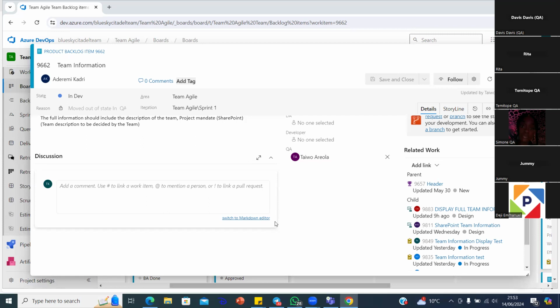And if it's a high priority issue, then you release a bug into the system, right? And you didn't fix it. So that is a disadvantage, because you took the story and the bug as different work items and worked on them separately, right? So it's possible that you release a product that's got a bug because you didn't address the bug as one entity with the story. Okay, all right, that's good.